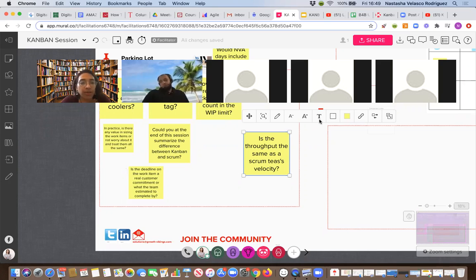Nowadays, as Scrum Masters, we have integrated work in progress limits, so we make sure that our Scrum is not a push system. But be careful, because Scrum doesn't necessarily set this in the framework. It is not demanded. Kanban does demand it, and it is a gift from Kanban to the Scrum community. So that was a big difference.